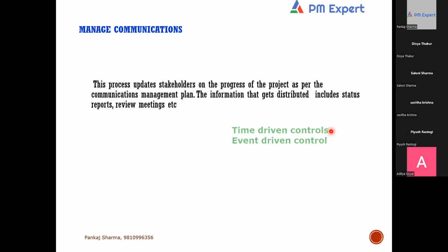Now, when we talk about a project end stage or phase end report or project closure report, or escalation or exception report, can I call them event-driven reports? Yes. So, when I say manage communication, basically these reports are included, right? All these communications are included. Maybe communication related to risk also, issues also, right? And that communication can be part of both time and event-driven reports. Now, we discussed various reports like weekly status reports, and event-driven reports like end stage report or end project report, right?